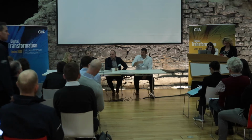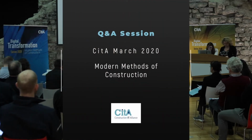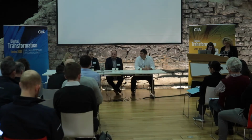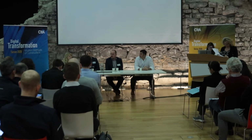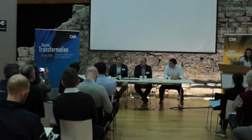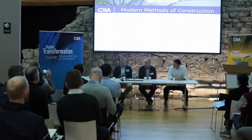Correct. I suppose because we produce stuff in the factory, the guys that we have on site are minimal. So a typical crew for us would be 4 guys and a supervisor, and them 4 guys will put up in the region of 3 to 4 houses of frames a week. Obviously the house has got to be finished. So we don't need lots of guys on site to put up our product.